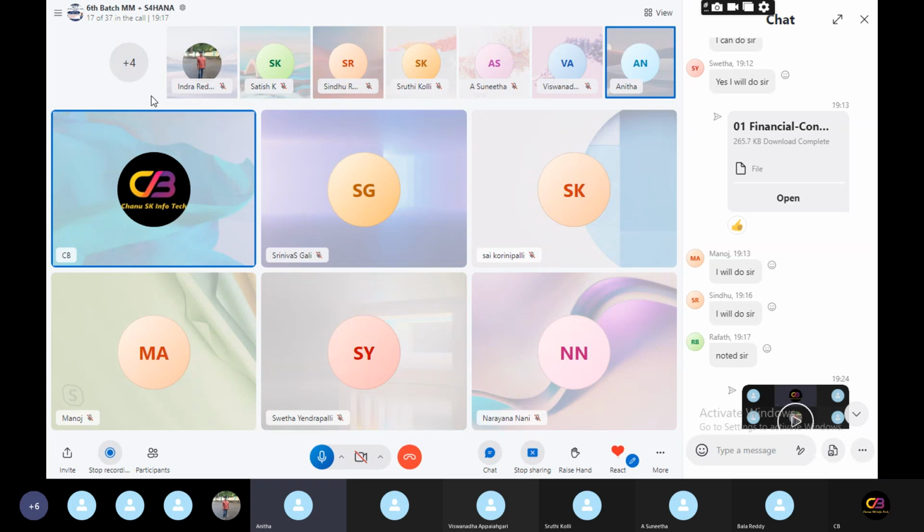In implementation projects, mostly we use ASAP methodology for ECC, and Activate methodology for S4 HANA. We still have brownfield, waterfall and agile methodologies, but most people use ECC and S4 HANA, so we have to concentrate on ASAP and Activate methodology. In this methodology we have some steps. How we gather the requirements is called the preparation stage, and then business blueprint, then configuration, and then the final testing stage, and then go-live stage.